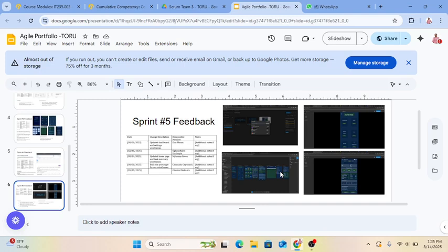And then one thing I recommend that we do better is to improve communication. Even though we had strong teamwork, there were times where communication within the group was inconsistent. Some team members were unresponsive for periods of time, which made it difficult to get timely feedback or updates. And I think the impact this had on my group was that it led to delays in addressing design changes, and it slowed progress on some tasks as we had to wait for inputs before moving forward.